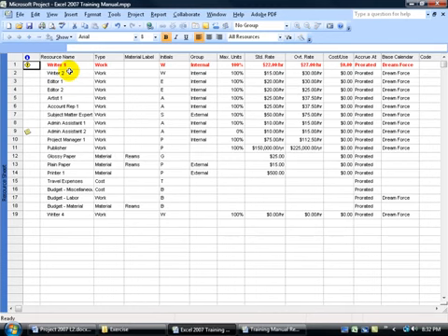So what do I do? Well, where is he over-allocated? In other words, in which project is he over-allocated? What days? How do I figure this out? Well, you can handle this and resolve it one of two ways. You can either use the level resource feature, which will just go ahead and affect your project and take the resource and dump him on a day that he's not being used in another project or other projects,